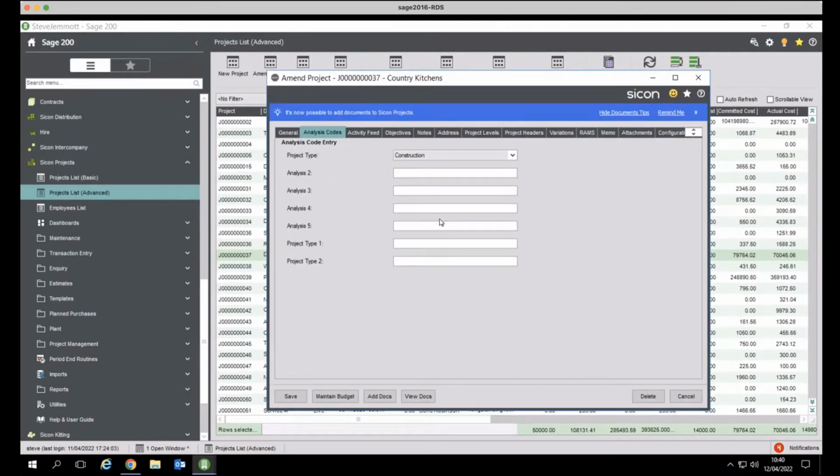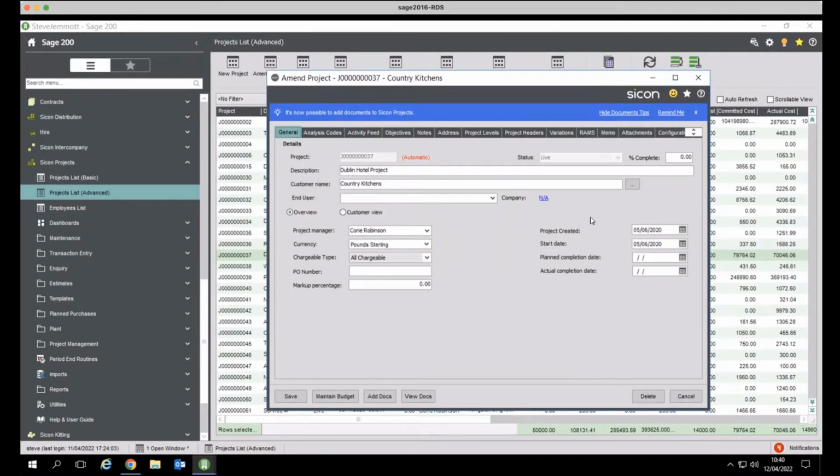And these you can tweak yourselves. We've got other things like start date as well, again, just for reports, and then you can set percentage complete. We've kept that simple, flagged that as 100%, and the project's then completed and disappears from being selectable. Perhaps you've missed off a transaction, just change it back to 99% or lower, and all of a sudden it's available for you to transact. So again, trying to keep it simple for you.